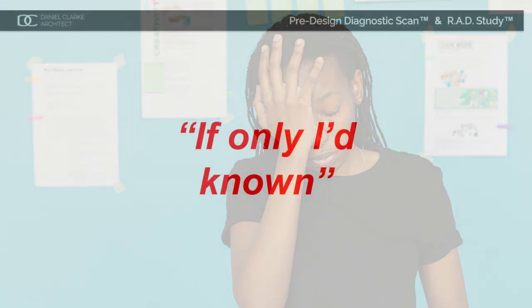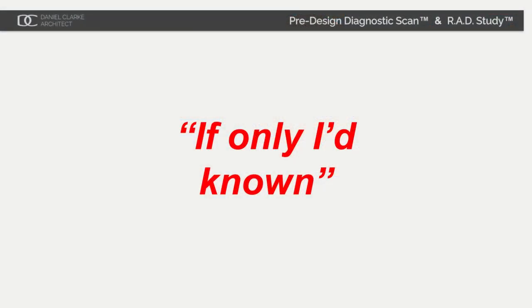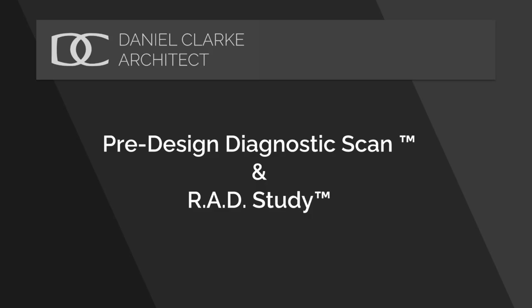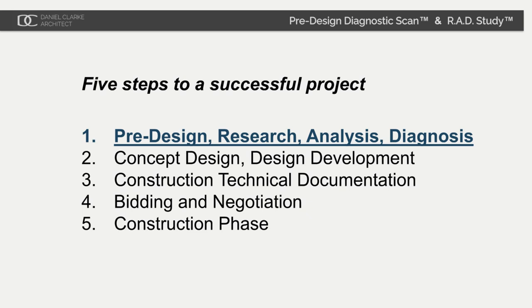Late discovery of your real needs or options leaves you crying, 'If only I'd known.' That is why I created the pre-design diagnostic scan and subsequent research analysis diagnosis study. There are five phases during a project when changes can be made: pre-design diagnostic scan and research analysis diagnosis study, concept design and design development, construction technical documentation, bidding and negotiation, and the construction phase.